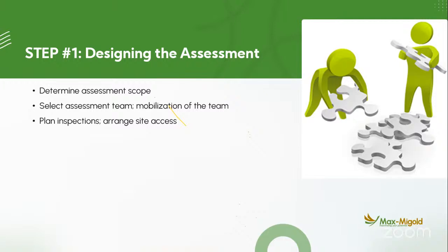Determine the assessment scope, select the team, mobilize the team, plan the inspection, and arrange the site. When you mobilize your team, then the other thing you need to consider is access to the site, because there are some estates whereby you need to get a passcode before you get into that estate. Then how do you do that? Then you have to have the right timing for your assessment.